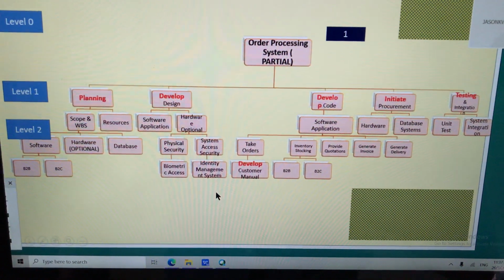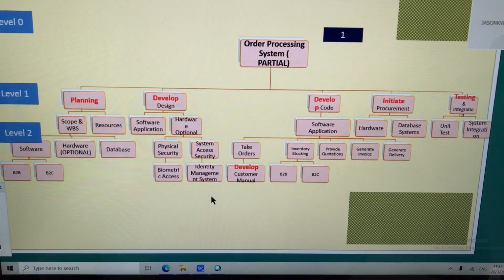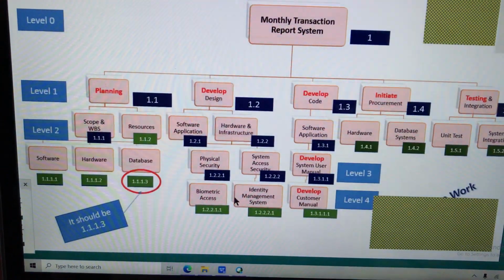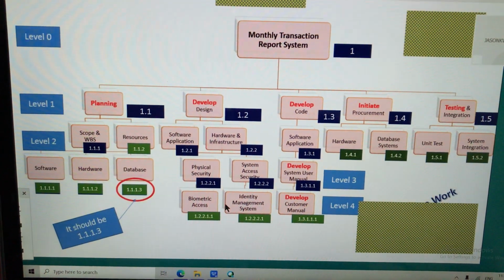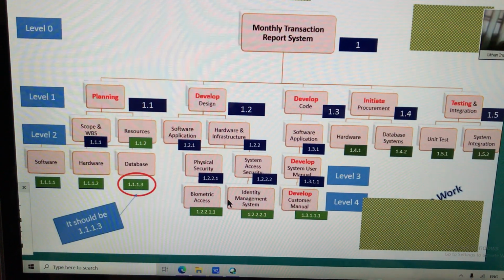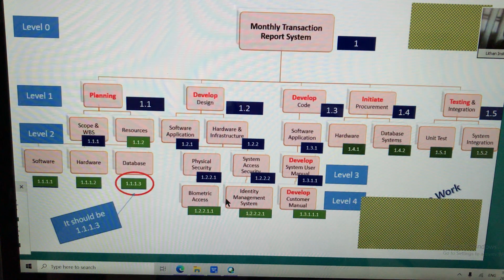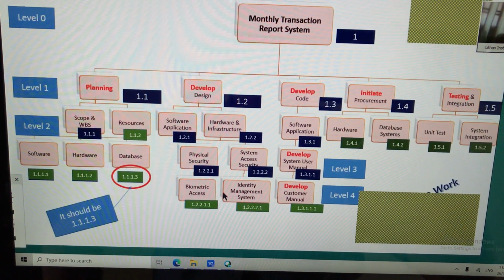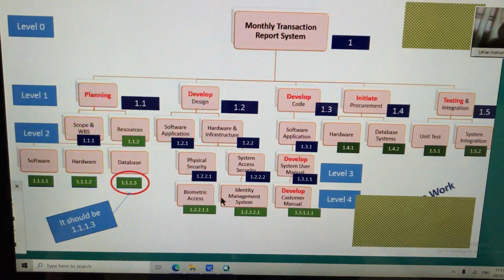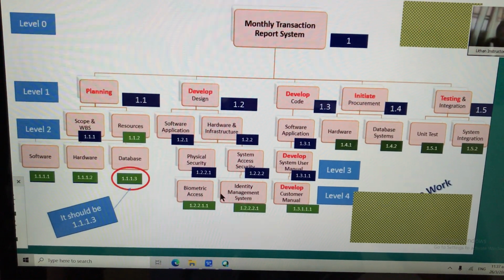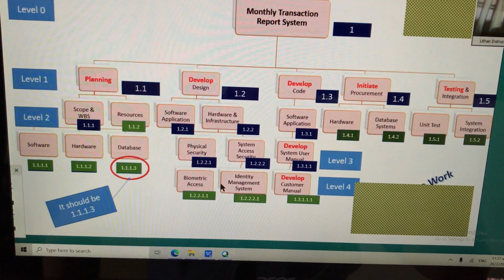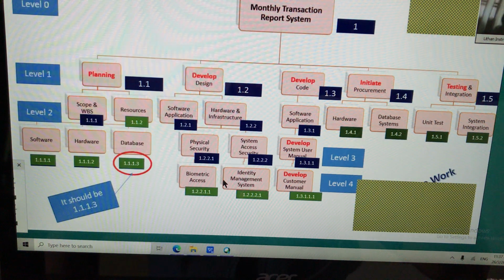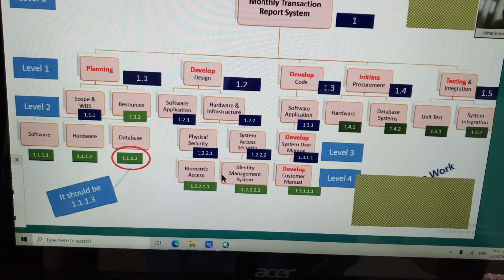The one thing good about deliverables is that we can do status reports easily for the customer. Yes, 100% correct. Not only status report, but also cost estimation and schedule. When you do monitoring and control every month, after the third, fourth, fifth month, when you give a project performance report to the sponsors, the project manager will ask all the responsible teams who have been allocated tasks to update it on a constant basis in a database.